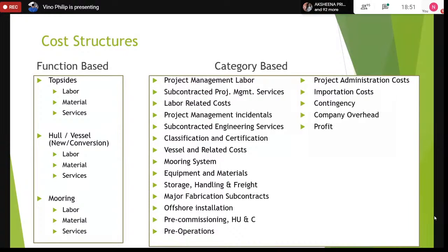So we have to review the pro forma contract. Any qualifications that we need, we have to return the proposal back to the client with all our qualifications. But the local regulations are generally mentioned in the pro forma contract. So in the pro forma contract, we get local regulations provided. So if we're doing work in Brazil or if we're doing work in Africa, even in India, there are some conditions that define what an international provider can do in local jurisdictions. They will say you have to meet a certain amount of local content.